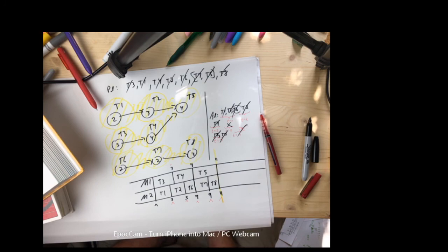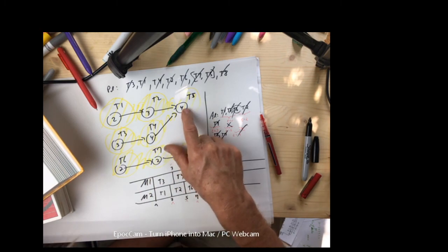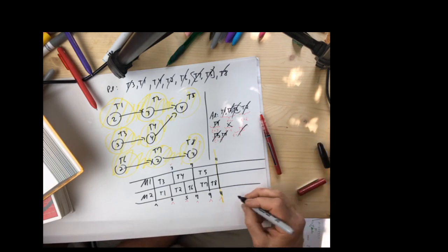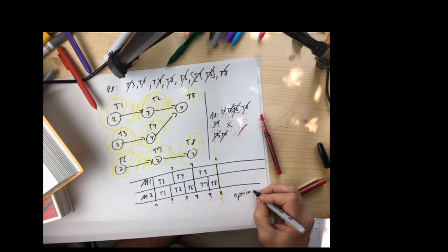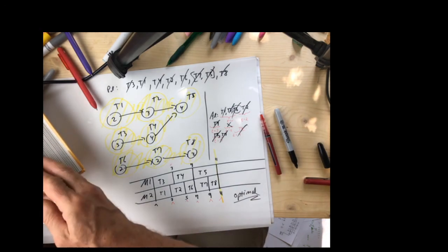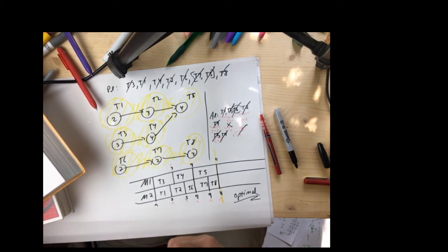nobody can do this faster, because 3 plus 4 plus 4 is 11. This is the fastest any group of people can do it. This is optimal. That is really cool. It is optimal because we've finally reached a moment in time which we know, because of the critical path, that nobody can do it faster, even if they had 3 people.